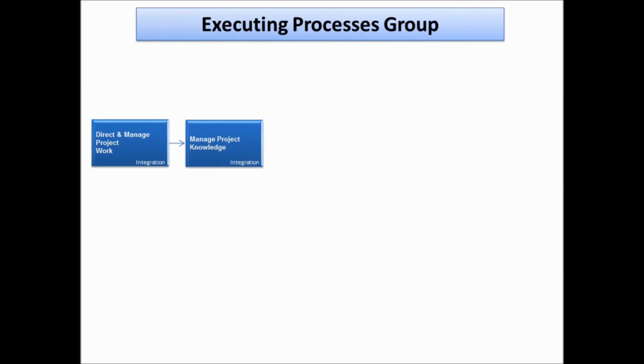Moving on to the next one, which is manage project knowledge. Now, this is a new process which has been introduced into PMBOK 6. Simply put, this is nothing but your lessons learned. In PMBOK 5, an earlier version, it was actually written under the closing process group. Now, the emphasis is more on documenting the lessons right from the beginning so that nothing falls between the cracks.